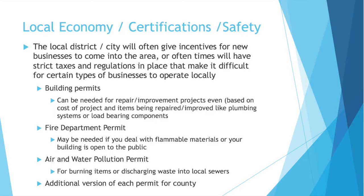That would be a great reason to consider safety. Or if your building is open to the public, what's your capacity? Sometimes when you go to a restaurant, you see the max capacity sign from the local fire department — these are things to consider. Some counties, cities, and local districts even have air and water pollution permits that you have to obtain in order to do business. And for some permits, just getting one isn't enough — you have to get one for your local district, one for the city, one for the state, maybe even a national level one. So don't assume it's one and done.